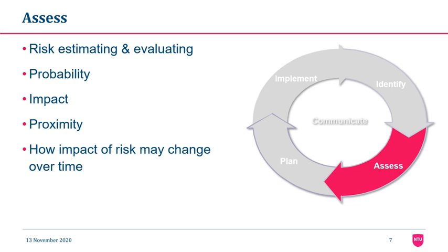There are different types of scales available for determining the risk likelihood and risk impact, and you should decide about it before going through the identification phase. So these scales should be clarified in the risk management strategy document that you should develop before going through the identification of risks.